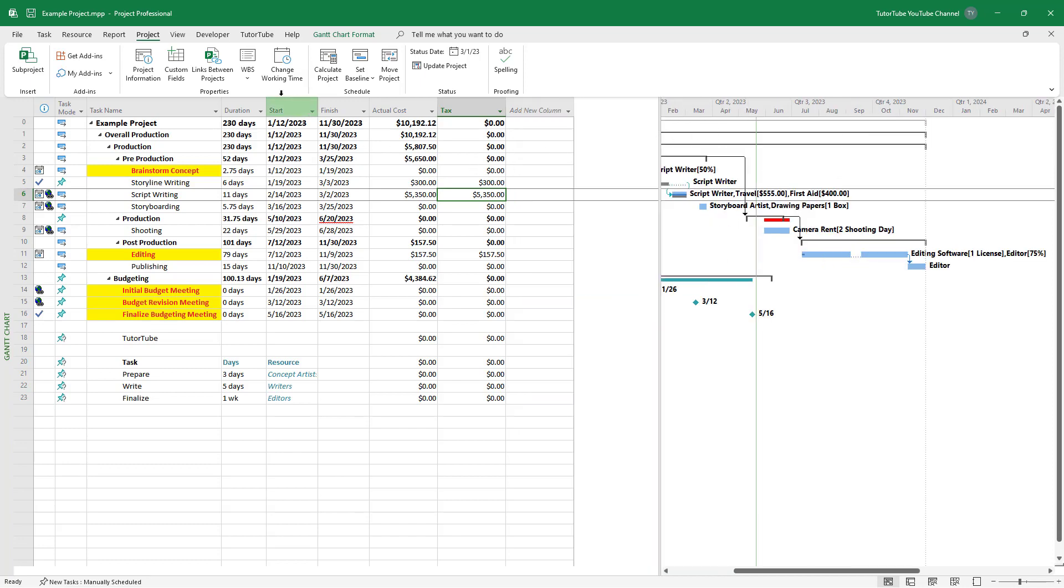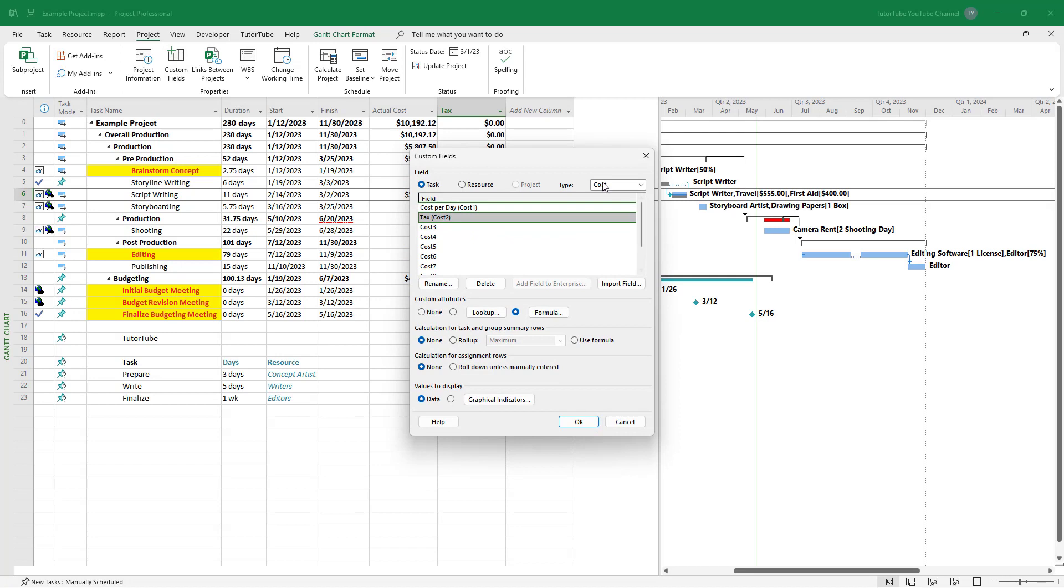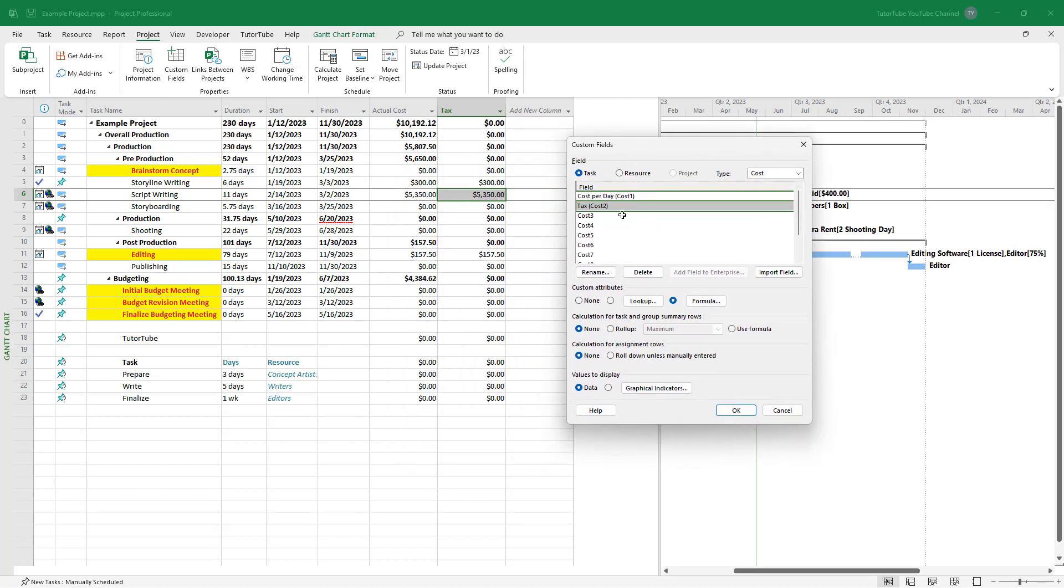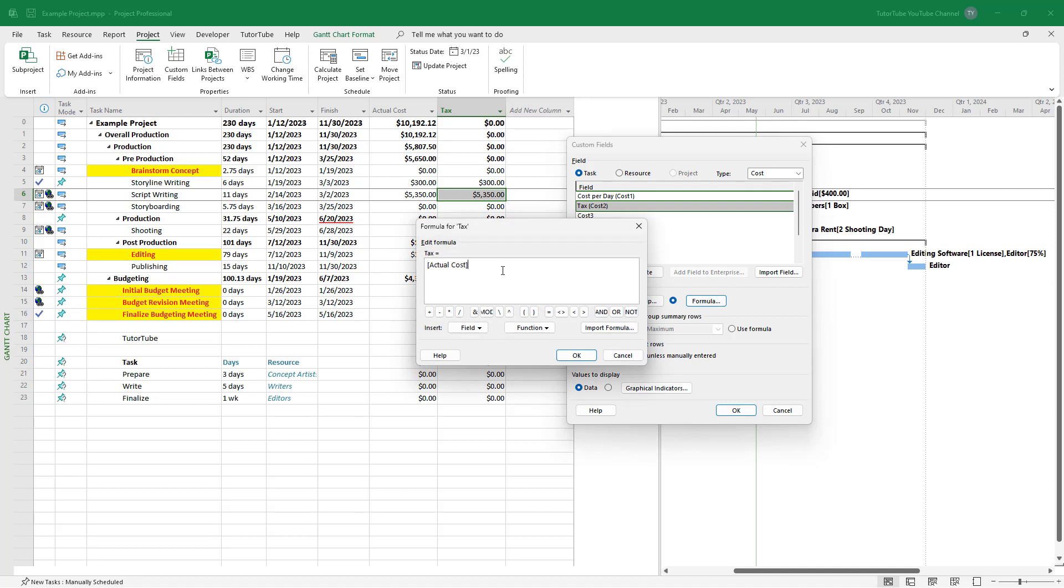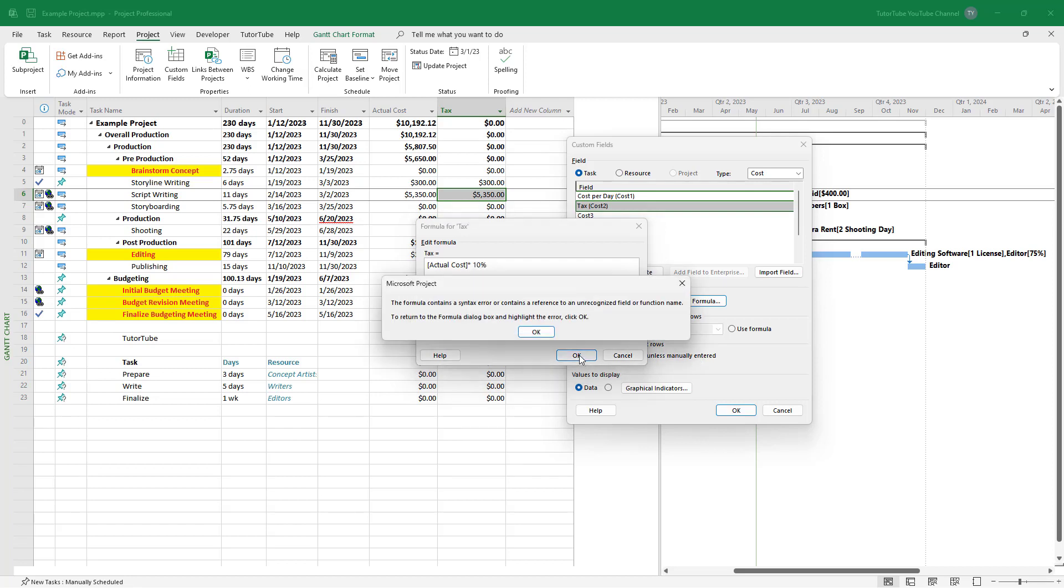So now to do that, I'm going to go to custom field again and add in the formula now. If I go to tax, I'm going to go to formula and then I'm going to multiply this right here by 10 percent right here, because that is the amount of tax.